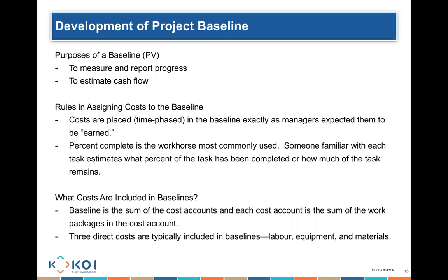done. Another approach is percent complete, which is a common way for us to get the evaluation. How do we do it? Well, you could say, for example, my task is going to usually cost me $150. I am finishing 33% of that task in week 1, so my budget baseline for week 1 is $50. Why? Because the cost for 3 weeks is $150. For only 1 week, it is going to be $50.